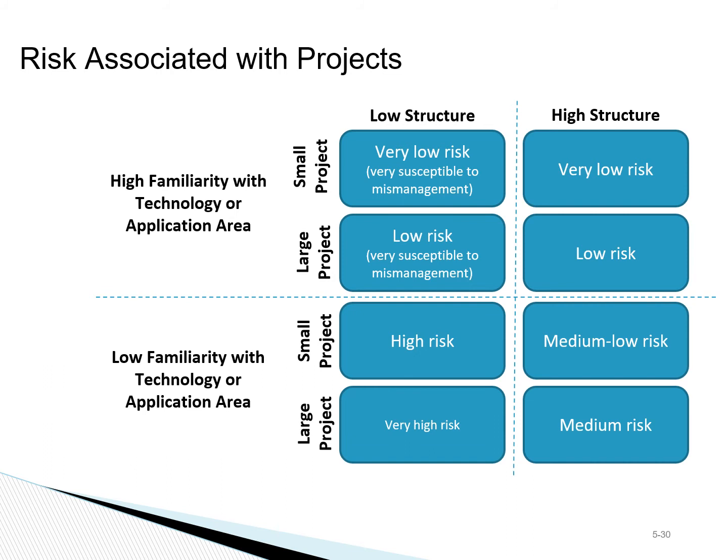As far as risk is concerned, obviously if it's a project dealing with familiar technology, that would be lower risk than projects involving technologies that the organization is not very familiar with. Similarly, as you would expect, smaller projects have less risk than larger projects. So risk is another element that we need to consider in our analysis.